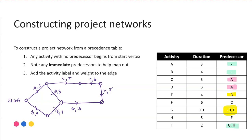And then finally I has predecessors H and G. So I there. Now, if an activity doesn't appear in the list of predecessors, that means it flows to the finish point. So we can see here we can account for activity A, B, C, D, E, F, G, H, but activity I is missing. So we can be confident that I flows to the finish line there or to the finish vertex. So as I said, unlikely that you would need to draw a full network from the table, but it is a very useful tool if you do get a more challenging question without that visual and you find that the visuals are helpful for you.